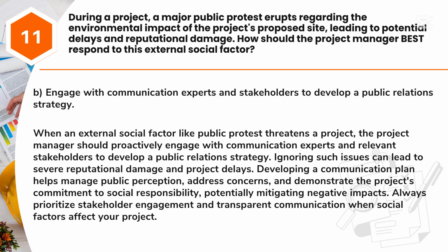When an external social factor like public protest threatens a project, the project manager should proactively engage with communication experts and relevant stakeholders to develop a public relations strategy. Ignoring such issues can lead to severe reputational damage and project delays. Developing a communication plan helps manage public perception, address concerns, and demonstrate the project's commitment to social responsibility, potentially mitigating negative impacts. Always prioritize stakeholder engagement and transparent communication when social factors affect your project.